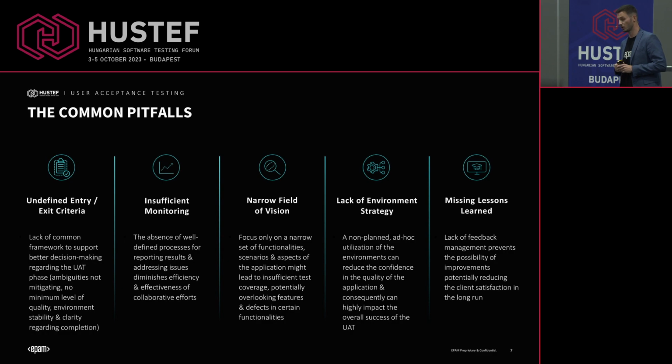The next is a complex one, I know. There is a huge dilemma that shall we have a dedicated UAT environment all the time, or shall we repurpose one of the existing environments to manage that type of activity? Also, we need to consider different factors. So what's our environment provisioning strategy? How can we scale our environment? How can we make the data correct? What are the accesses that we need to provide? So there are certain factors here, and not to mention the cost and also the resource implications that we need to work with when we have a given project.